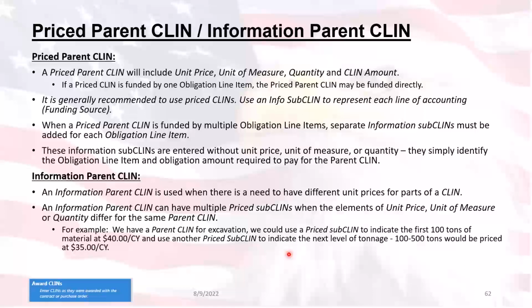It doesn't matter what you name or label the award CLINs or the modification CLINs inside of RMS, though I would highly recommend that you use the same structure as what's in CEFMS, because that will prevent any confusion from the field users who are not familiar with all of that stuff, to make sure that they're putting things in the right location, the right dollar amounts on the right CLINs, and things like that. But again, this is some more information that you can go ahead and read at your leisure.